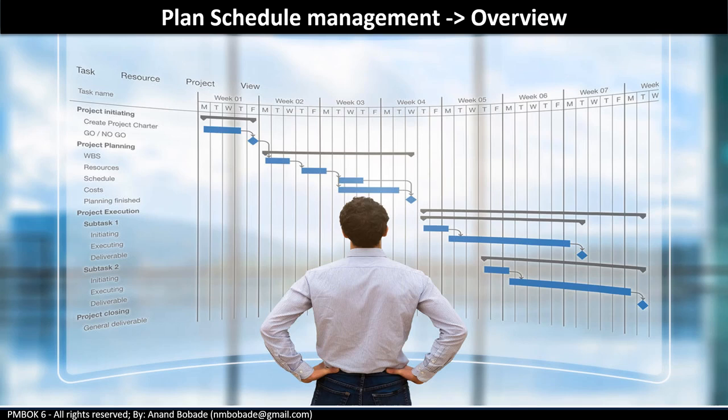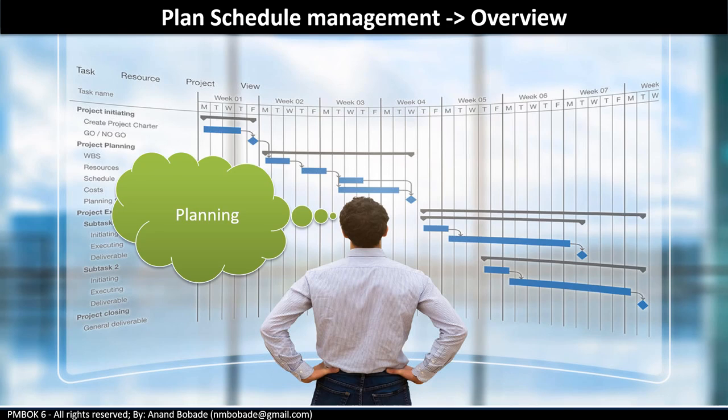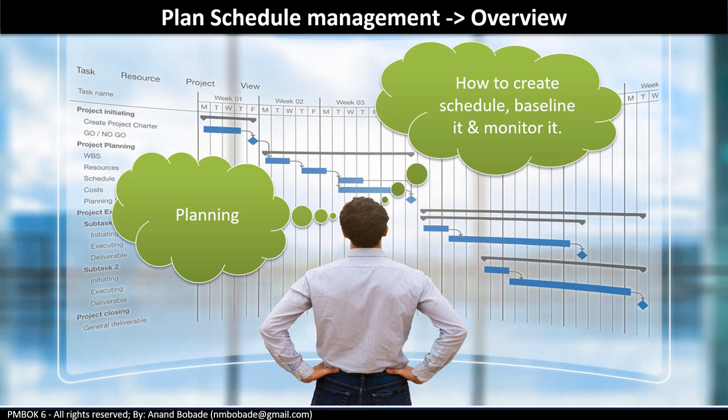Now think for a moment about the plan schedule management process. It is about schedule planning. Note that we are not creating any schedule here. So what are we doing? We are thinking how to create a schedule, how to identify activities, how to sequence them, what template will be used, what tool will be used to create a schedule, who will help you to create the schedule, what are the roles and responsibilities, how the schedule will be baselined, how the schedule will be monitored and tracked throughout the project life cycle. So now imagine if you could have created the schedule and baselined it by following the above activities, then you would not have faced the issue that I explained earlier.